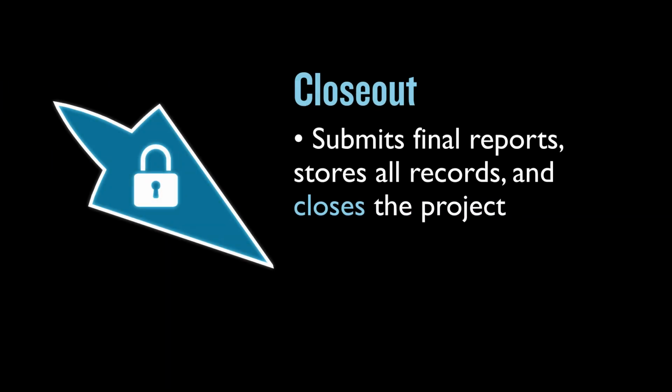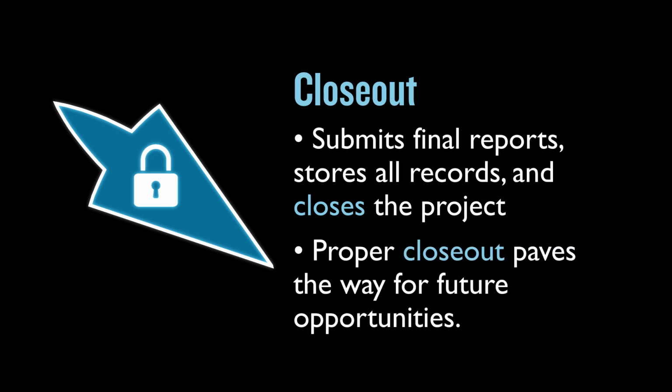The final part of post-award is closeout and involves submitting final reports, ensuring all records are properly stored, and officially closing the project. Proper closeout can pave the way for future funding opportunities. That's a lot, so let's take a bit of a deeper look into many of the post-award functions.